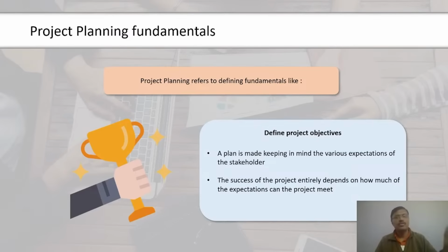The outputs of this process are the activity duration estimates and project document updates. The activity duration estimate is represented in terms of the range of possible results. For example, 10 days plus or minus 2 days, that is, the activity would take a minimum of 8 days and a maximum of 12 days. In the next screen, let us look into a business scenario to understand this concept better.